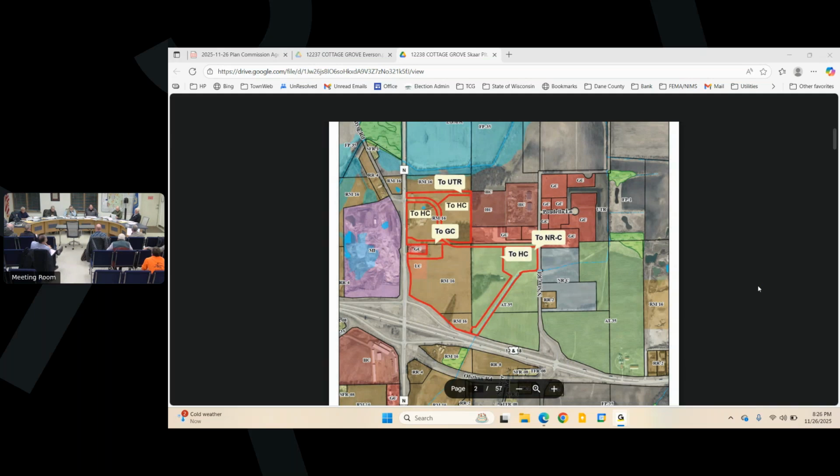How do you stub in your regional septic system then? You just leave it underneath the road until such time as somebody buys a lot. Well, there'd be laterals into each lot to accommodate it, and if there's one that's not used, you just keep it capped. Oh, okay.